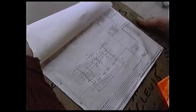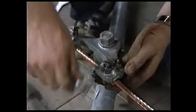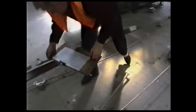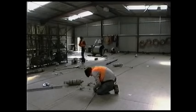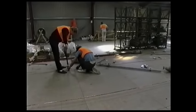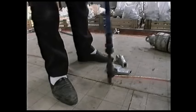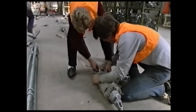Every item of line-side equipment was detailed on a computer-controlled design and inventory system. From a detailed construction drawing for each location, all the parts needed to make the headspans, the steelwork, attachments and insulators were pre-assembled on jigs before shipment to the line side. This was to be a considerable time saver, vital in minimizing disruption to a busy main line.